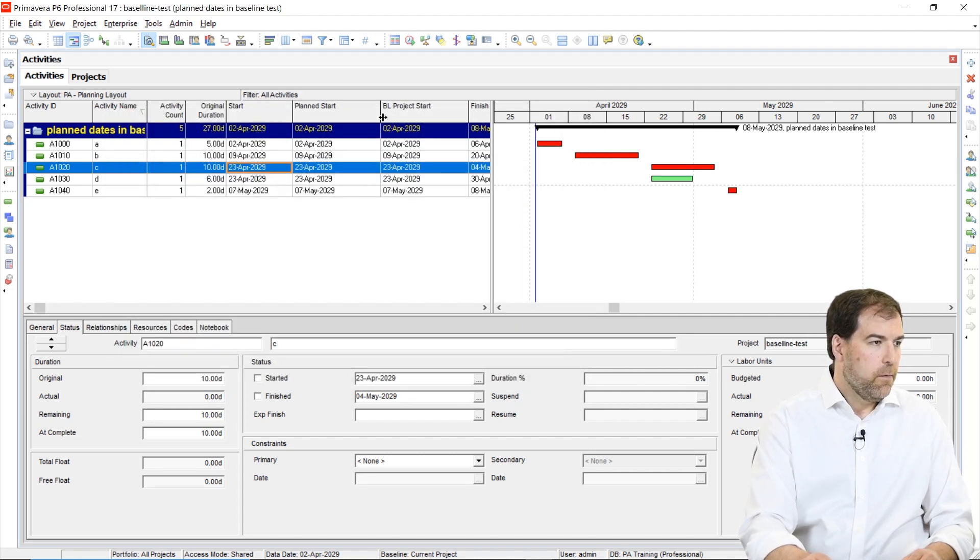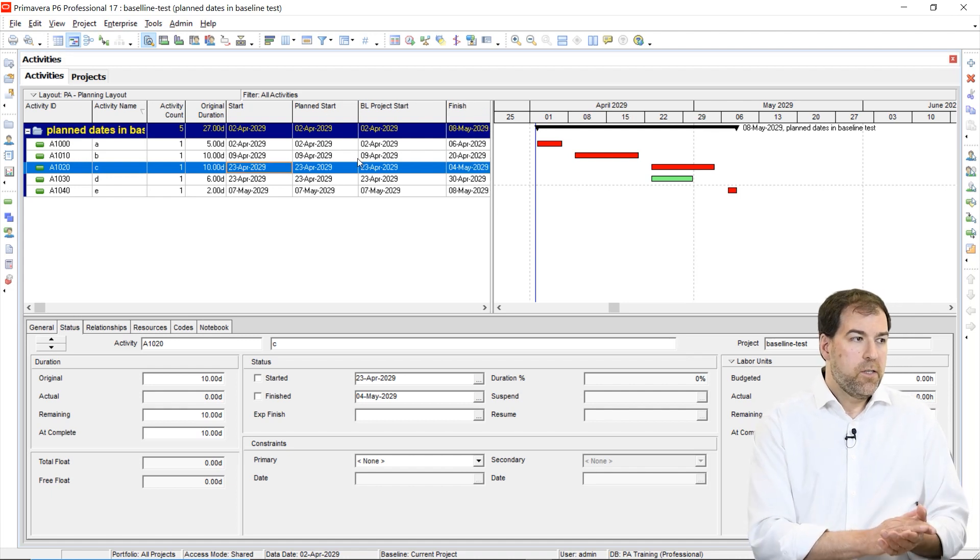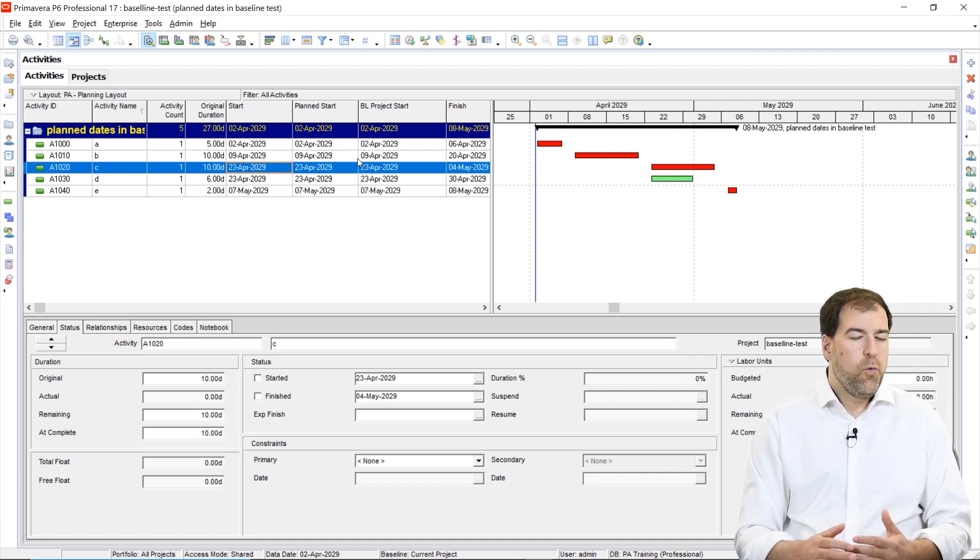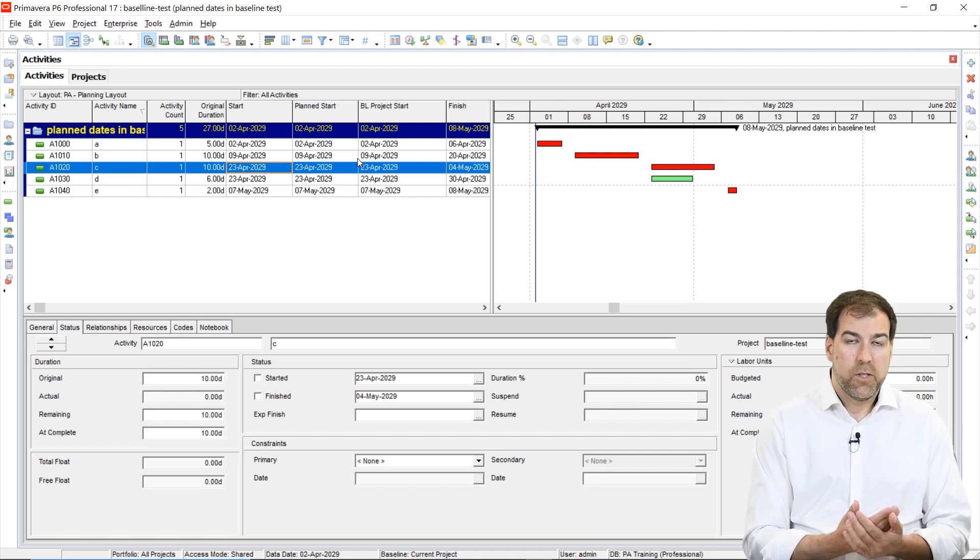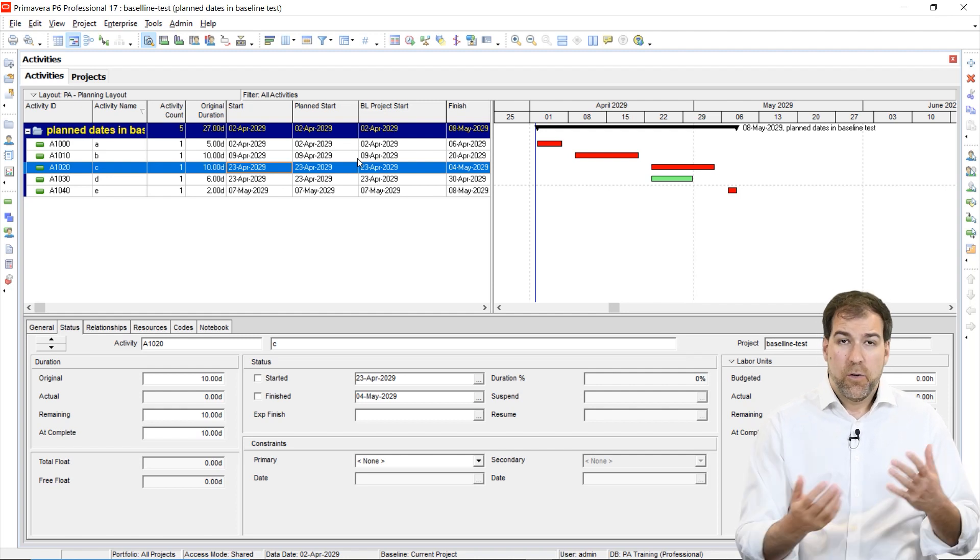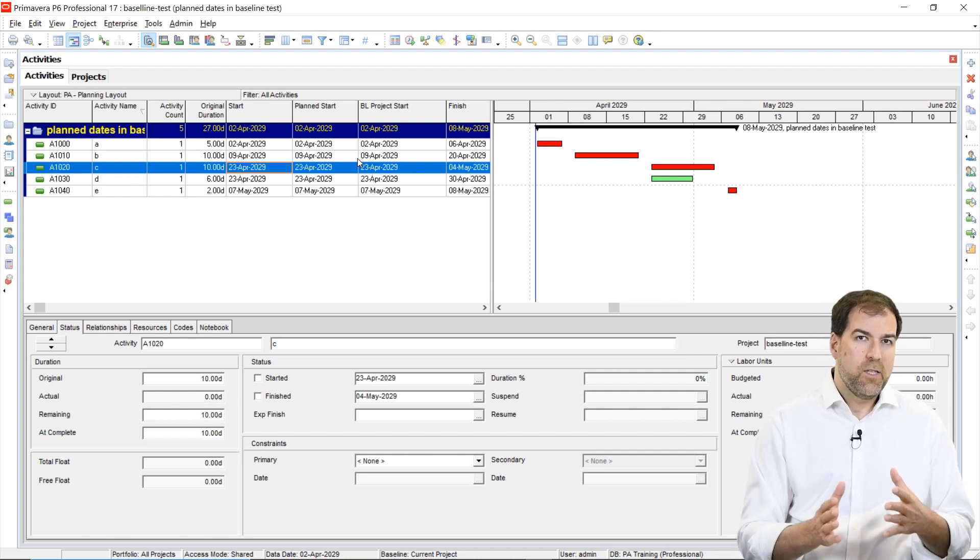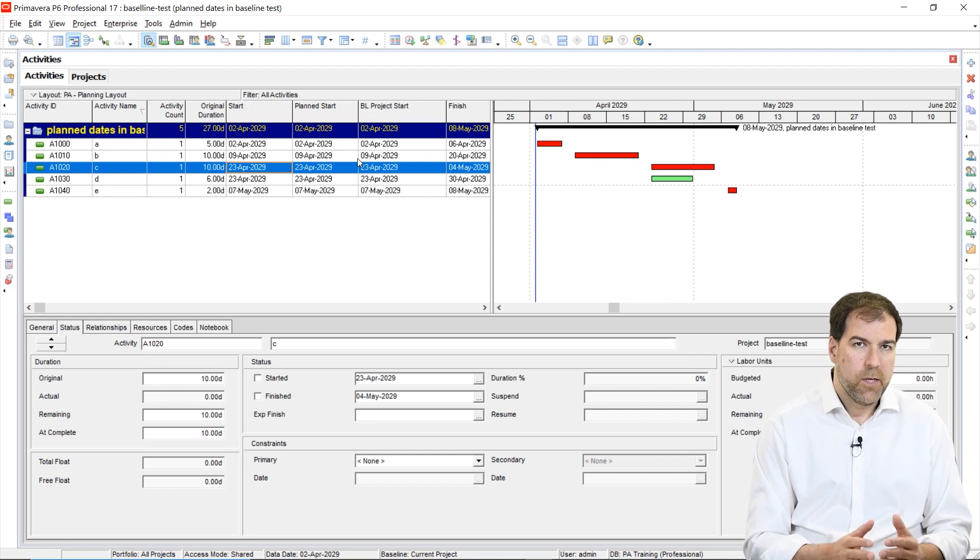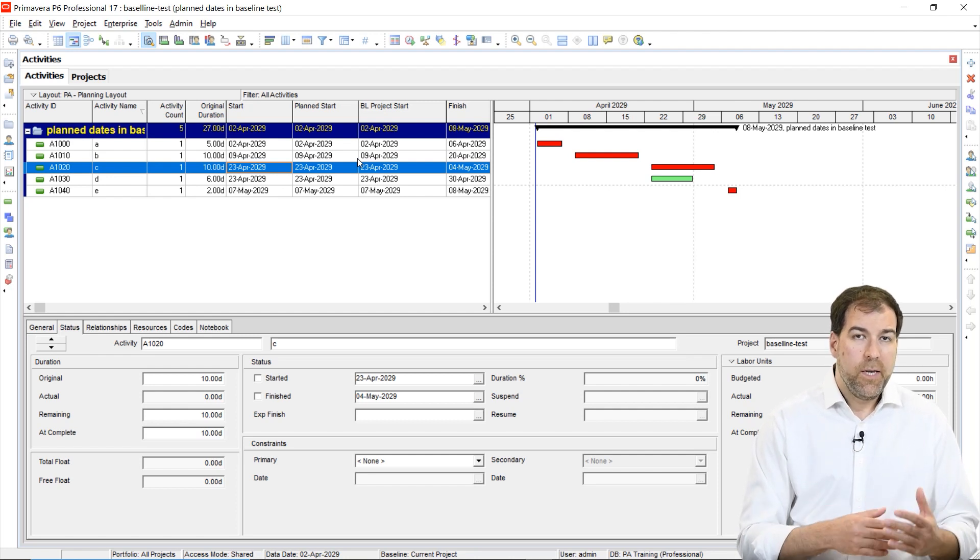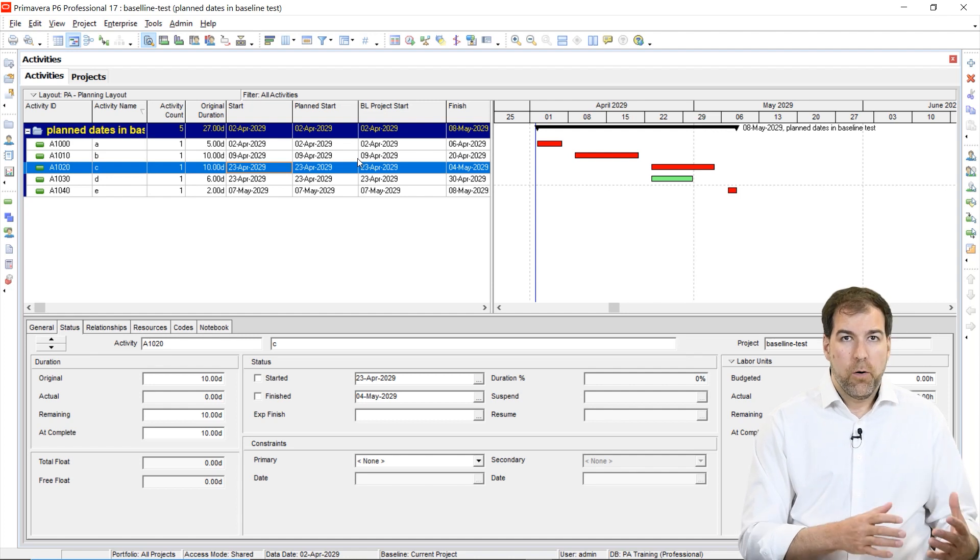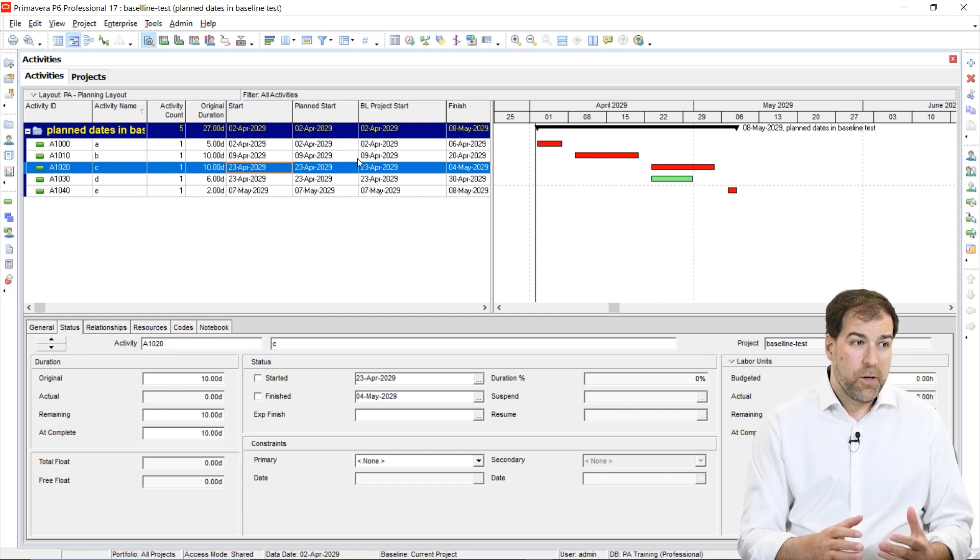So yeah, we do have these columns called planned start and planned finish. We never really use them though. You know, we're used to using mostly our start and finish columns, sometimes early, late start, early, late start or finish columns, but planned start, we don't really use very much. But planned start does come into effect when we are working with baselines and it can be a problem for us.